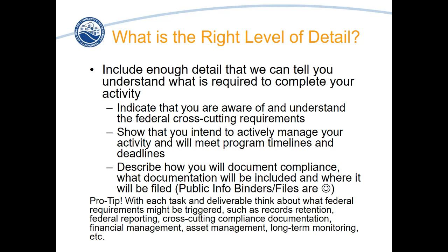So, you know, when you're thinking about your tasks, you can list your tasks, you can list your deliverables separately. One thing that I often do is I'll have my list of deliverables, and it'll be deliverable 1, deliverable 2, deliverable 3, deliverable 4, and then when I'm doing my tasks will be task 1.1, 1.2, 1.3, 1.4. That aligns with deliverable 1. Task 2.1, 2.2, 2.3, 2.4.